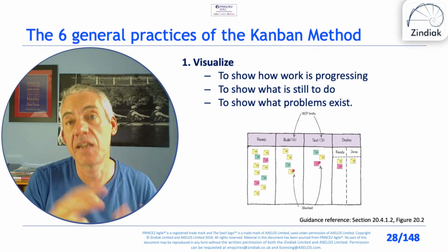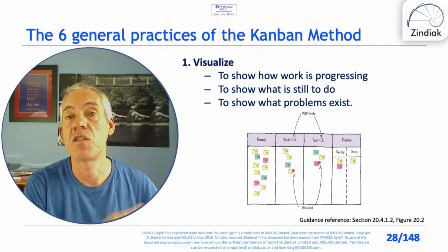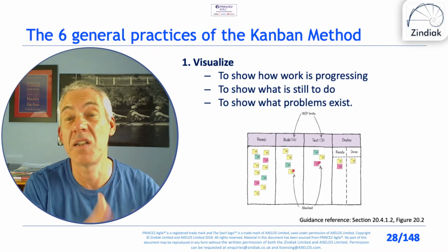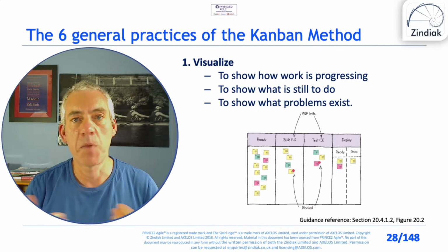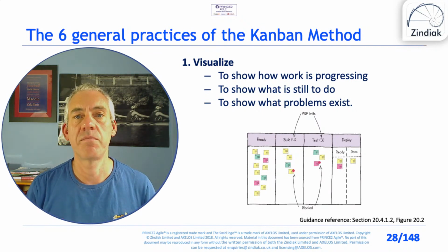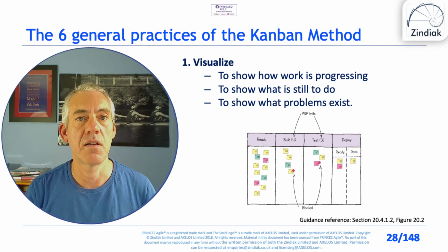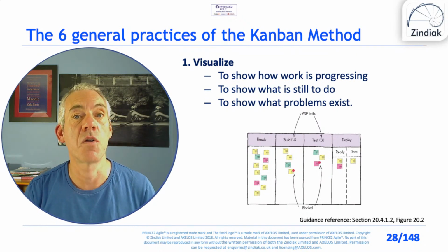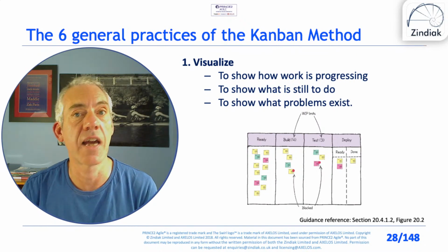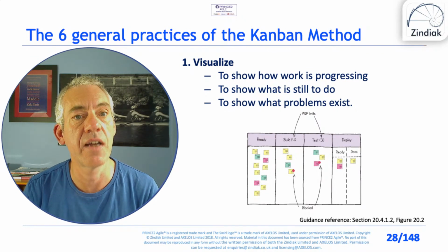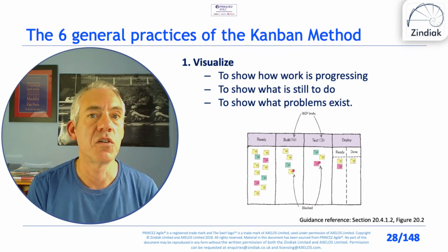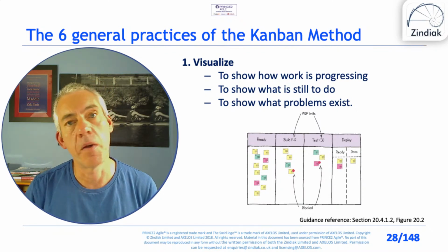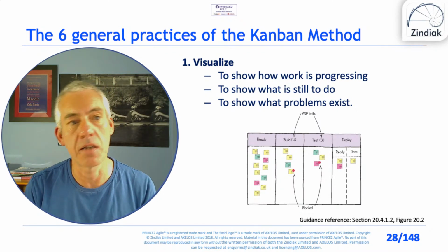So you need a balance between having some small backlog items so you get something delivered early, which will give people confidence, both within the development team and external to the Scrum team, the stakeholders, that we have actually delivered something. We're not going to get to the end of the sprint and have delivered nothing. But equally, start the bigger, more difficult stuff fairly early on, so we've got a bit of contingency. So you just need to balance those two things.